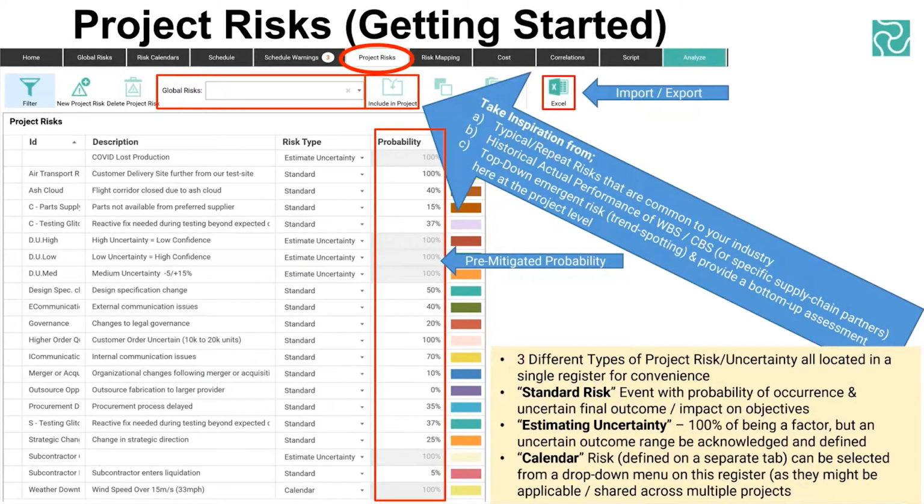So maybe if you're using ARM, say, and it has a probability impact matrix diagram, PID matrix, with greens, yellows, oranges, and red risks, then you might just want to have some consistency and show everything that's an amber risk because of other reasons that might not be financial. It could be like a reputational risk makes it red, for instance. You might want to have that sort of distinction. It's up to you how you use it.